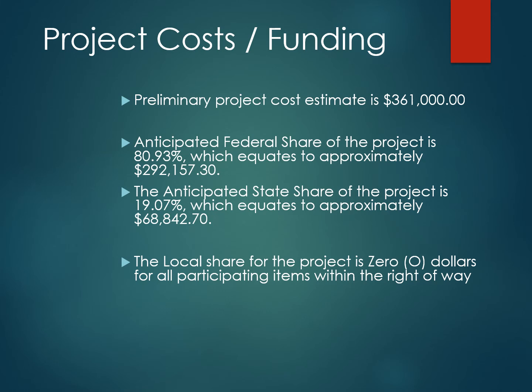There will be no local share for this project for all participating items that are within the right-of-way. All work is considered to be completed within the existing right-of-way, so we do not anticipate any local share dollars having to be spent on this project.